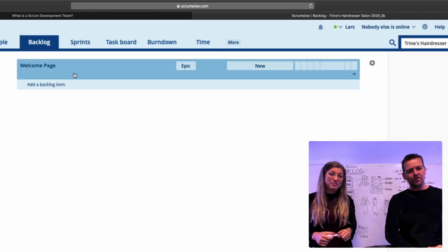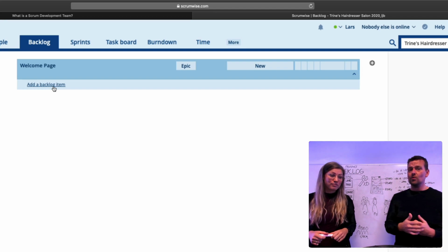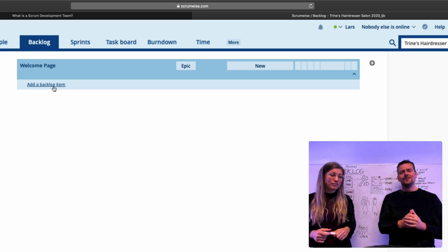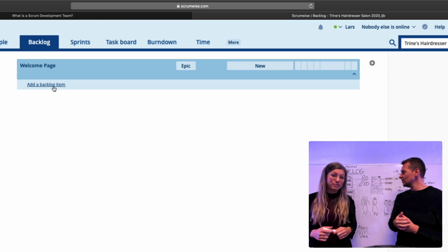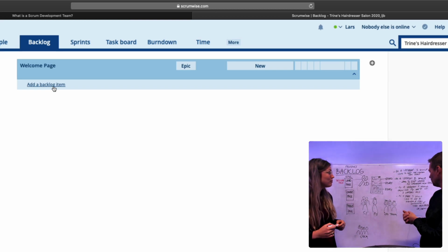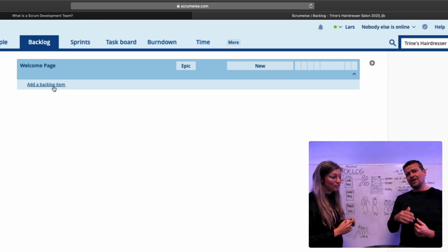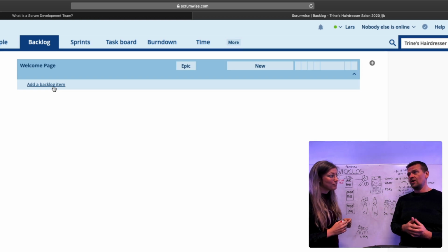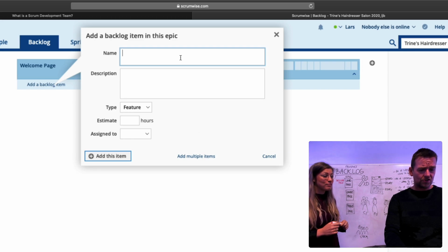Now with the epic story available, I'm going to add a couple of stories because to create the welcome page, there's a lot of stories to actually be done to get that completed. Each story is actually a feature for the welcome page. So we have different features available. First of all, we had one called, as a user, I would like to be able to see the top 5 products on the page, right? So that's the first one I want to create. I'm just going to right here say top 5 products.